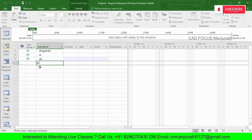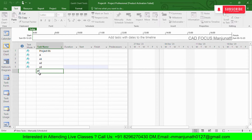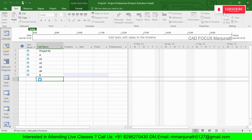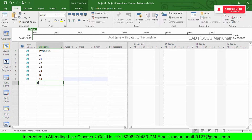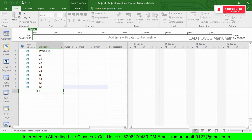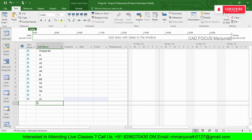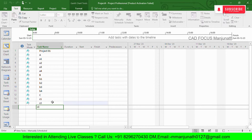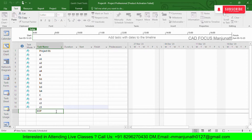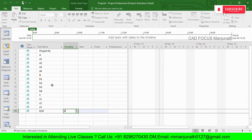Continuing with small letters: A2, A3, A4, then capital B, B1, B2, B3, B4, then capital C, C1, C2, C3. At the end of the project I'll add 'EOP' (End of Project) with a duration of zero. The capital letters A, B, and C represent Work Breakdown Structure (WBS) levels, while the small letters A1–A4, B1–B4, C1–C3 are the individual activities or tasks.